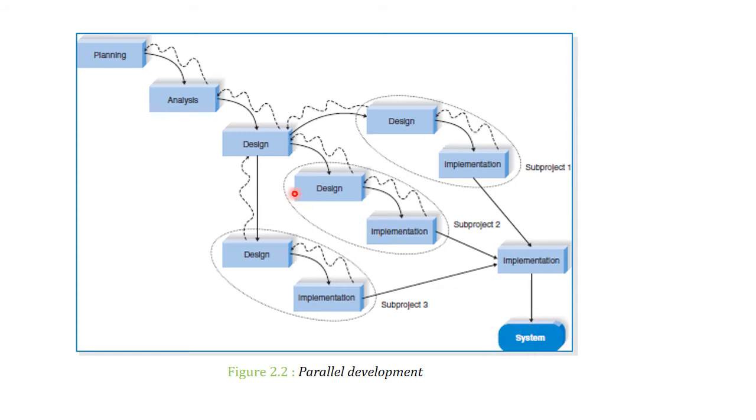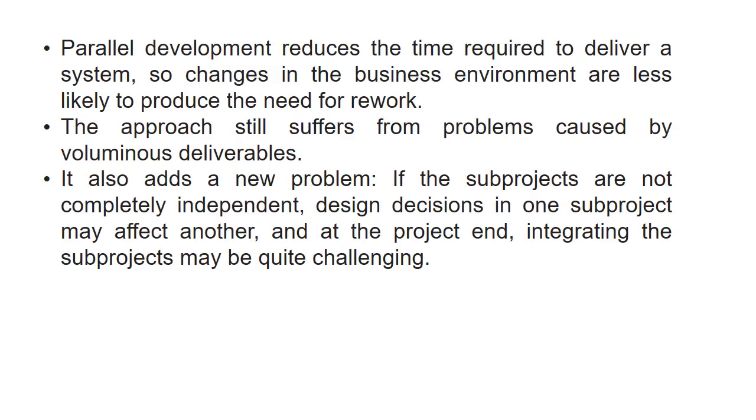But when we talk about the disadvantage of parallel development, we can see that while parallel development helps us reduce the time required to deliver a system, it also has a disadvantage, because if any of the sub projects remains incomplete, we cannot integrate all the sub projects.